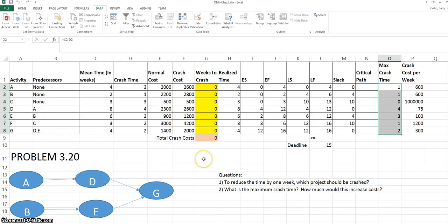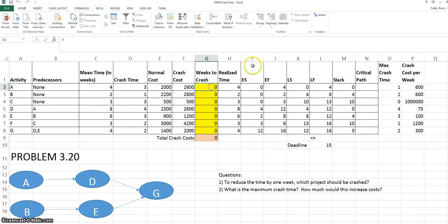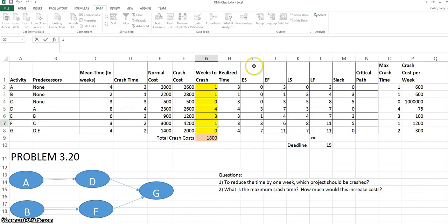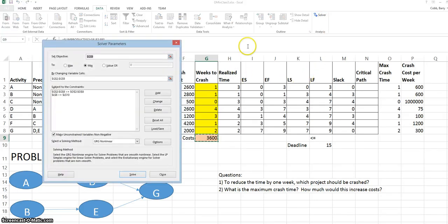What we would like Solver to do is tell us the best combination of weeks to crash that minimizes the crash costs while still meeting the deadline and the max crash times. Starting values can be important for the algorithm that Solver uses to find the solution. And typically, the maximum crash times are good starting values to enter into Solver. So I've entered the max crash times. And now I will open Solver back up and click Solve.